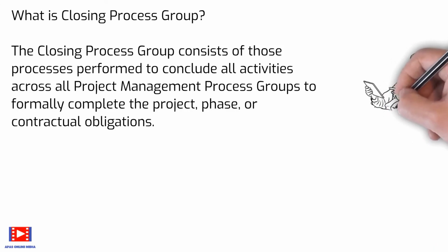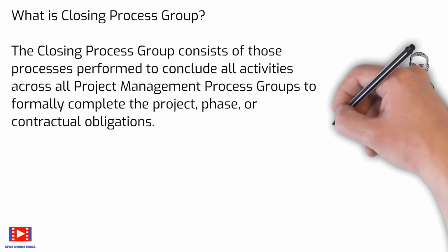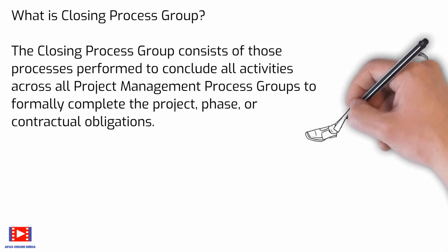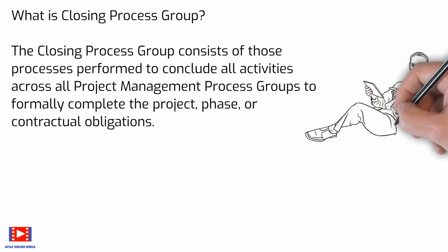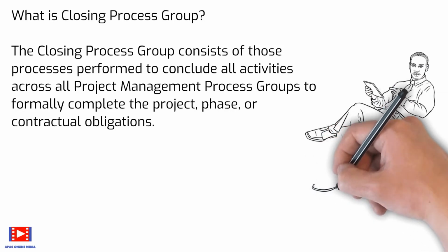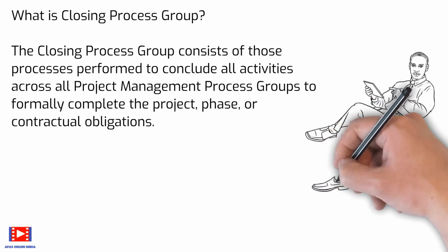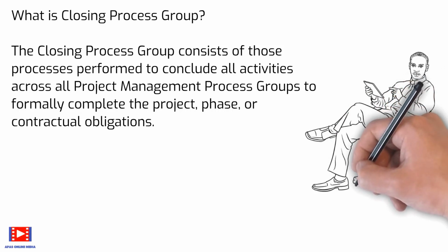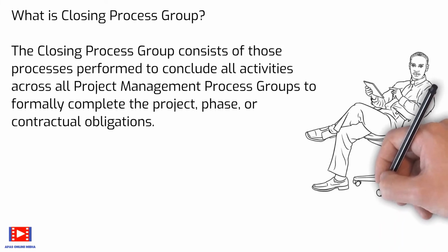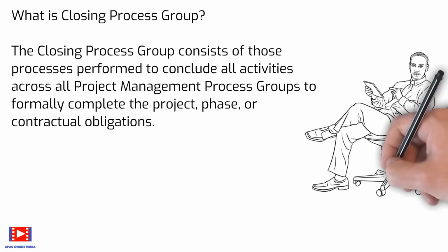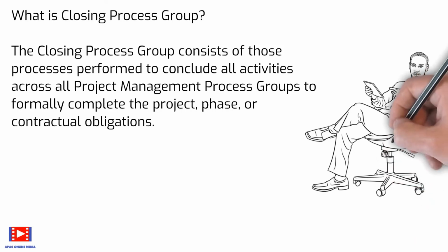This process group also formally establishes the premature closure of the project. Prematurely closed projects may include, for example, aborted projects, cancelled projects, and projects having a critical situation. In specific cases when some contracts cannot be formally closed, for example, claims, termination clauses, etc., or some activities are to be transferred to other organizational units, specific handover procedures may be arranged and finalized.